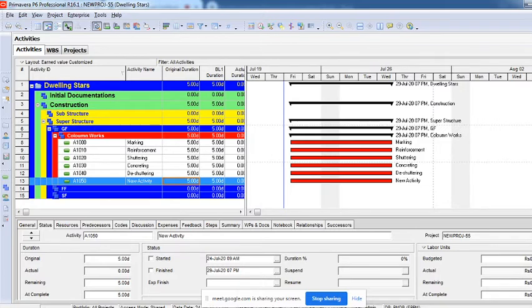Dependencies are there in a lot of ways, not only in terms of work. I was explaining that both activities may have to be started simultaneously. There's a relationship called start to start. So we have given one of our activities a start to start relationship, but the problem is you do not have cash flow, or there is unavailability of resources, which is a bigger problem. The resources are not available on that particular day, so you cannot start simultaneously. When you assign the durations, you will understand that. So estimating duration is very important.